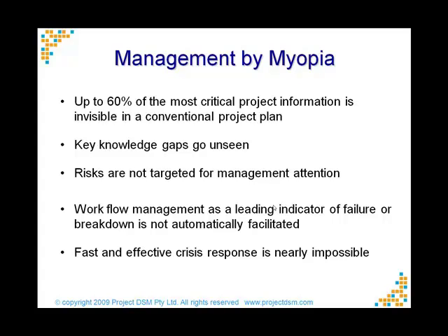And unfortunately, our planning tools, particularly our conventional CPM tools, tend to move us forward only in one direction. They allow us to plan forward, but not to manage the iteration cycles and the feedback cycles effectively. And this is about half the information in the program. And unfortunately, it's the part of the information flows where most of the risk lies. And if we're not managing that, that risk will migrate into the body of the program and cause us problems.